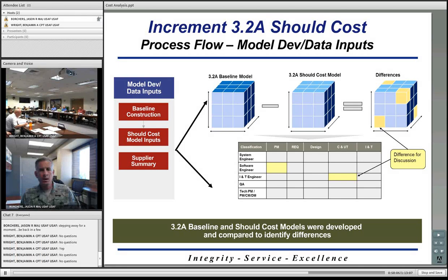So then they came up with their should cost estimate, and this, the step 3, data analysis, this is where they started using all the different methodologies to come up with their cross checks. They did various things such as bottoms up or engineering methodologies. They used that. Parametric modeling, top down or analogy. I believe they used them all in order to come up with cross checks to just determine, is what we came up with in step 2 correct and as accurate as possibly can be.